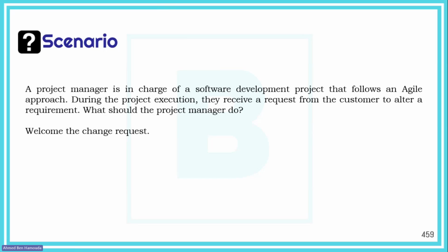Now, another point to raise to your awareness is that generally, for example in Scrum, we cannot really accept change requests in the middle of a sprint because usually the team is sprinting. So actually, the whole scope of the sprint is frozen.